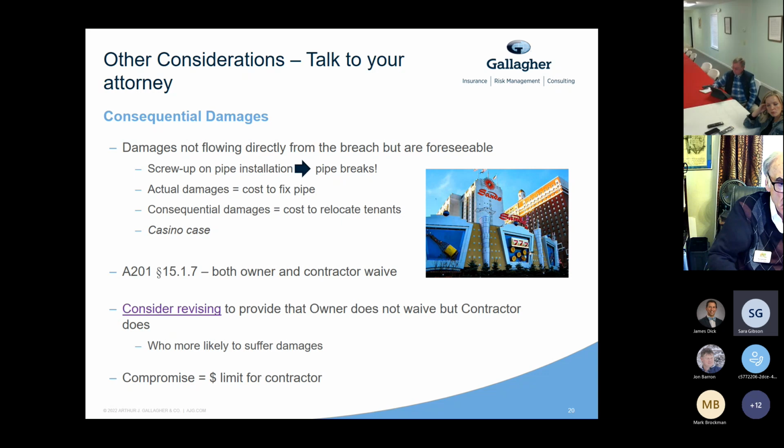They hire a general contractor to do work. The total cost of the project was around $16 million, but they paid the general contractor $600,000 for their consulting services. As they go through the project, there is a 4-month delay in the project of the Sands Casino. They end up suing the general contractor for, I believe it was, and don't quote me on this, around $14.5 million. And again, the contractor was only paid $600,000.